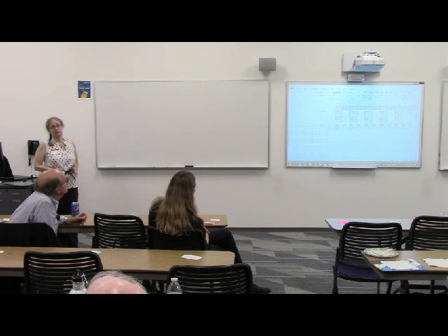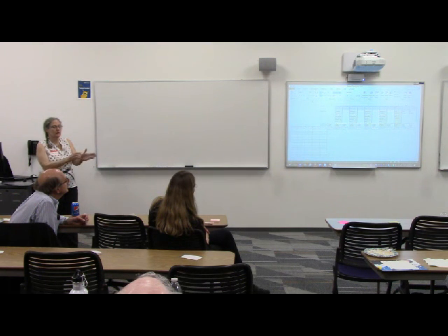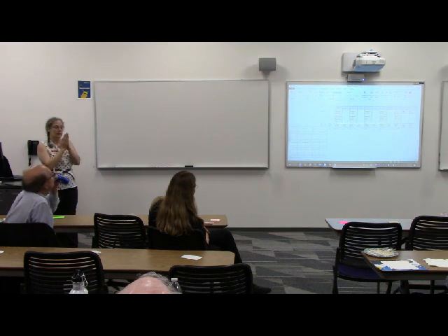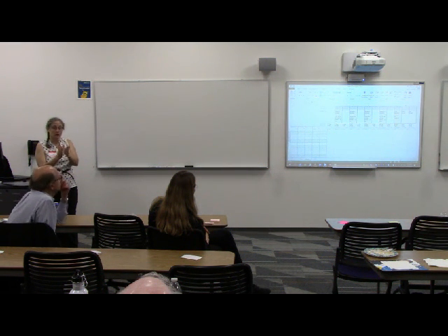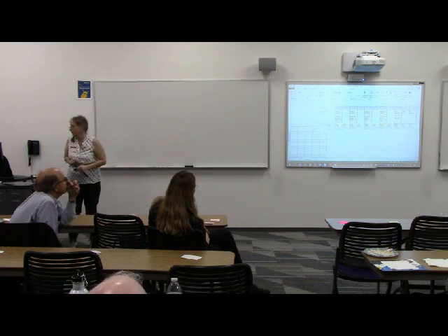So yeah, the trade shows need to be managed well, but after you do this kind of planning exercise where the team is committing that they're going to finish this by here and this by there, product marketing has actually a better idea of what we're likely to complete. And then as the iterations, as the sprints go by, and you see what's getting completed and what isn't, you can adjust as you're going, right? Yeah. Okay.